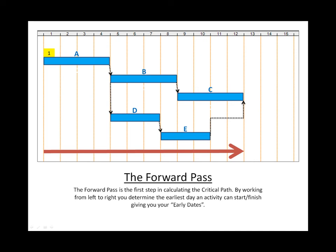Activity A, our first activity. This activity has no predecessor and can start no earlier than day one. Day four will be the early finish. Following through the finish to start relationship, day five is the earliest activity B will be able to start and day eight is the earliest it can finish.